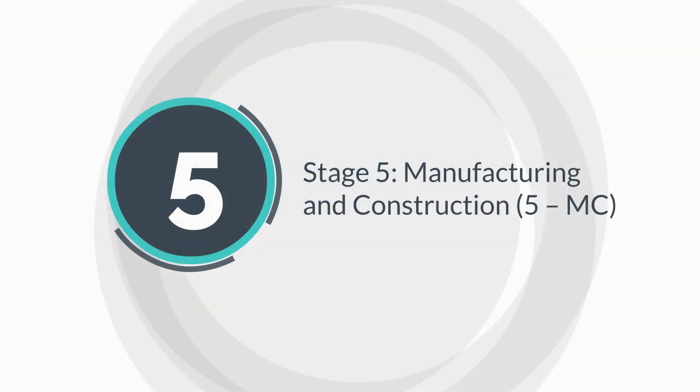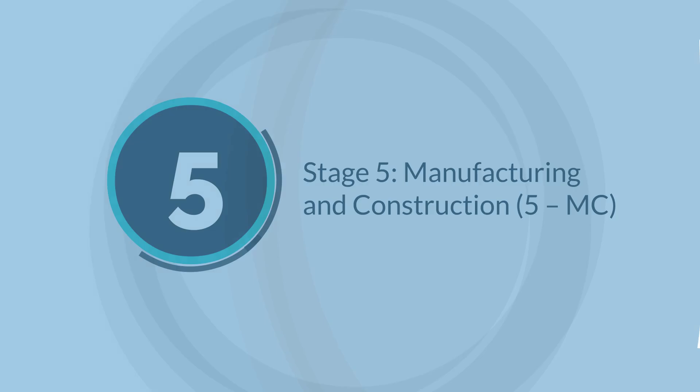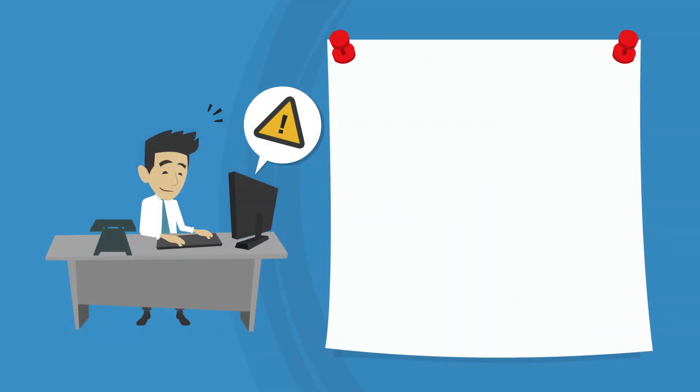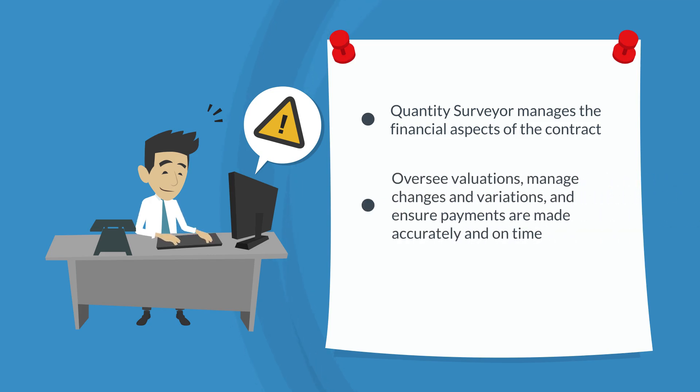Stage 5, Manufacturing and Construction. In the Manufacturing and Construction phase, the Quantity Surveyor manages the financial aspects of the contract. They oversee valuations, manage changes and variations, and ensure payments are made accurately and on time. They also monitor the project's financial health, keeping the client informed of any cost implications.